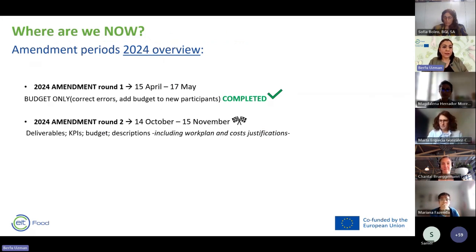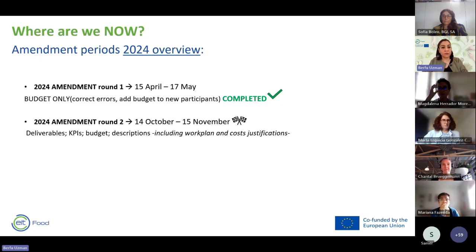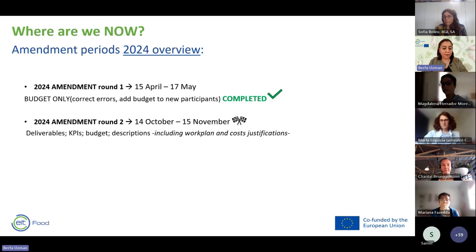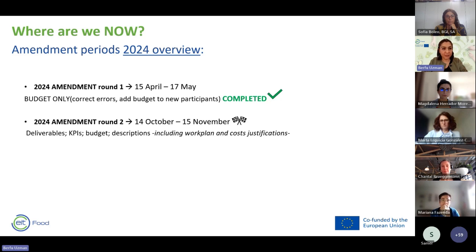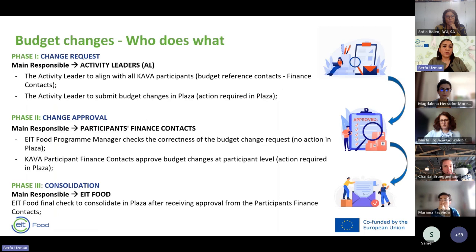In the first amendment round in April–May, we asked for budget figures — corrections of errors or budget additions for new participants. The second amendment round will be launched on the 14th of October and finalized in mid-November. We would expect to see any required changes for deliverables, KPIs, budgets, and descriptions.